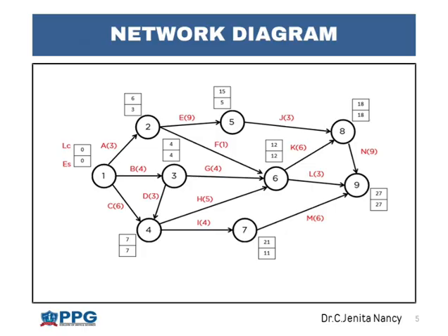Here is the clear representation of a network diagram. Here number 1 to number 9 are called as the nodes, and number 1 and number 2 are the nodes connected by only one activity known as capital A, and the time estimate for A is given as 3. And also I can say that number 3 and number 6 are the nodes connected by only one activity G, and the time estimate for G is given as 4 over here, and so on.